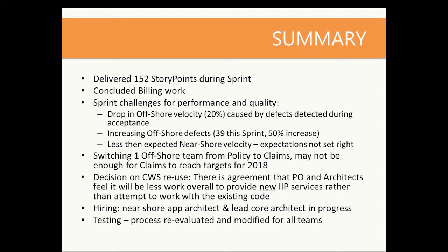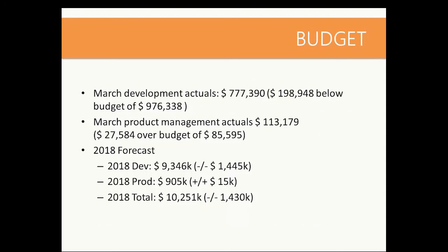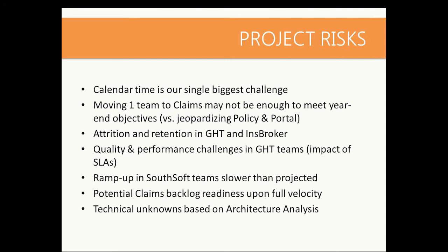If you go to the next slide, it typically shares some more data around budget, because a program on time, on schedule is one thing, but you could do that by either cutting corners and leaving a whole lot of defects in the system, and that's going to cause trouble later, or you could do it by burning too much budget too soon. And that's why I talk about how our budget is being spent here. And in the third slide that I would use as a report to my steering committee, which is on the next one, Fernando, if you can click, yeah, an overview of the risks.